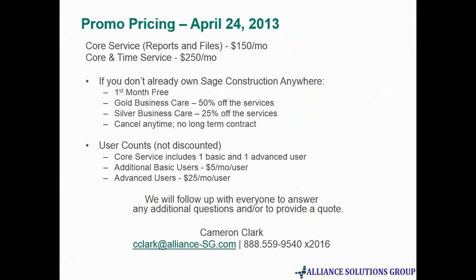You can also have a project manager that approves the supervisor's approval. So it's a step above. After the supervisor approves the time, the project manager could approve it. And then ultimately you have the payroll administrator who approves all the time and can do anything they want with the time, as well as post it into the system.